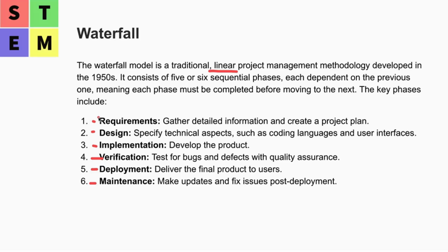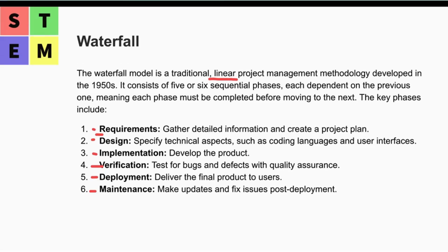All right. So the key here for the waterfall is it requires a kind of checkpoint after each stage. Sometimes it's called a toll gate. So for example, when a project team finishes the first stage, let's say requirements, it produces certain documents and meets certain expectations.